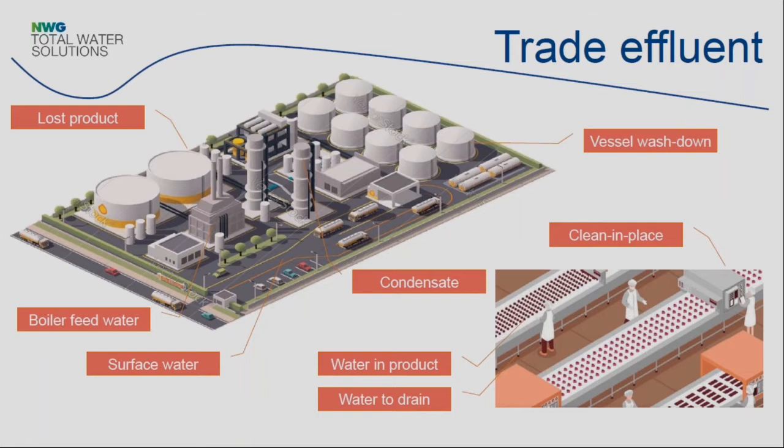They still needed a treatment plant, but that treatment plant then became smaller because this particular contaminant had been removed, and it was a different process. So just by looking at what I call potentially the quick win options, that client avoided unnecessary expenditure.